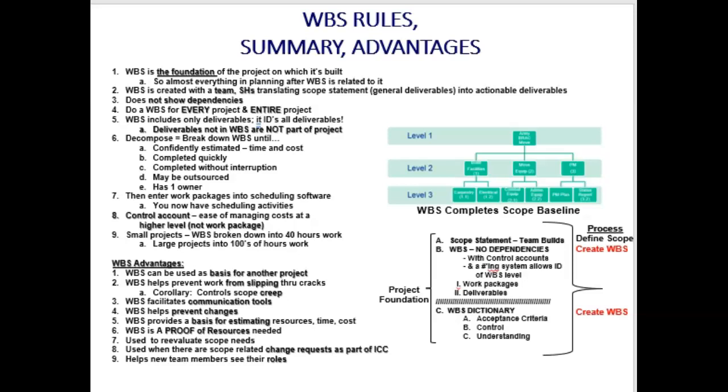It doesn't say which comes first and which comes second in a priority order, right? That's what the schedule is going to do. So the work breakdown structure breaks that down into work packages and deliverables. And then I'm going to add to that, because it's not enough information in those boxes in that hierarchy.